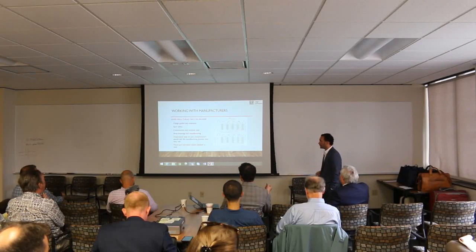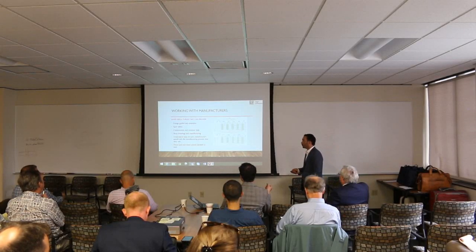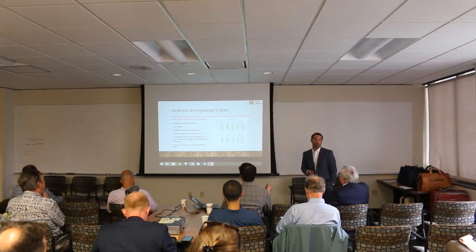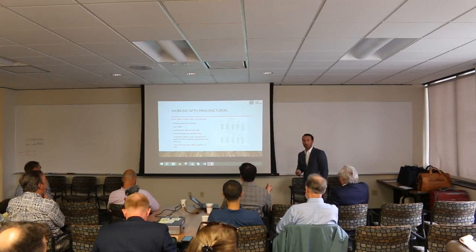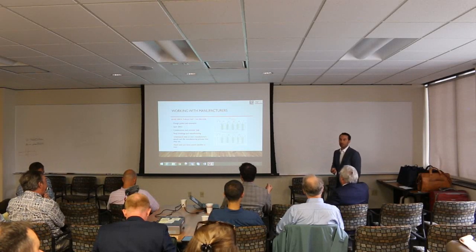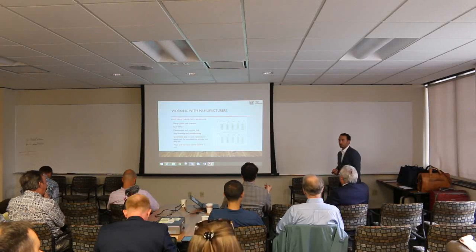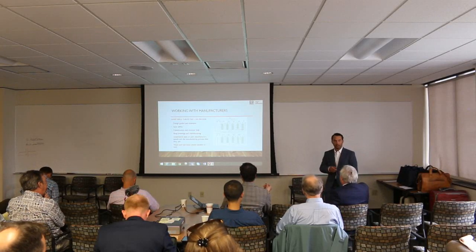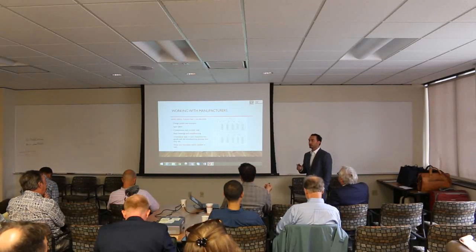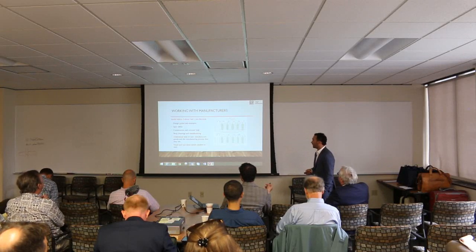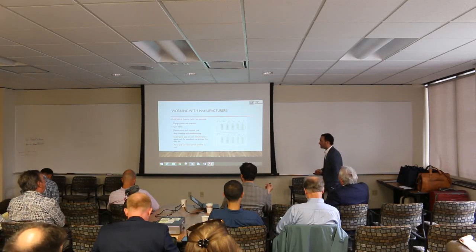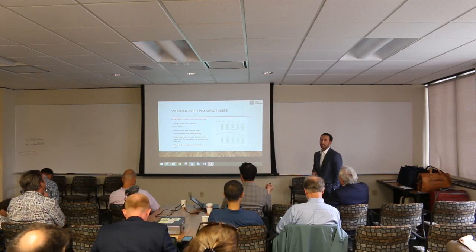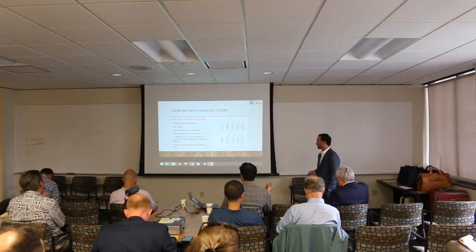They can also walk you through the shop drawing process, what to expect, what they need to see from you to be able to produce shop drawings. A little different than any other wood material as far as shop drawings go. I might liken it to a tilt-up job where they need to know each panel's dimension, each opening, everything right down to the nitty-gritty of them. They're also going to help you understand the sizes of all the members they have, how they manufacture, the process they use, the efficiencies that you can get out of it if you design your panels right.